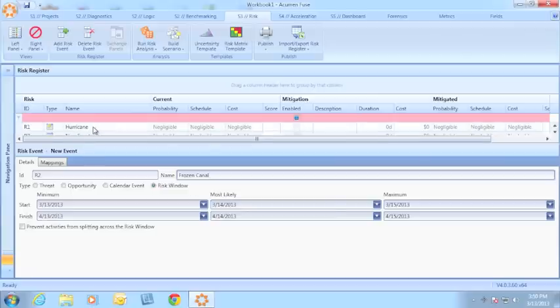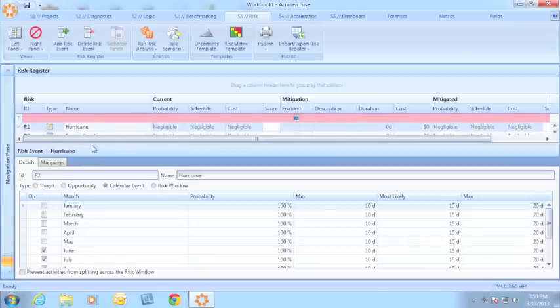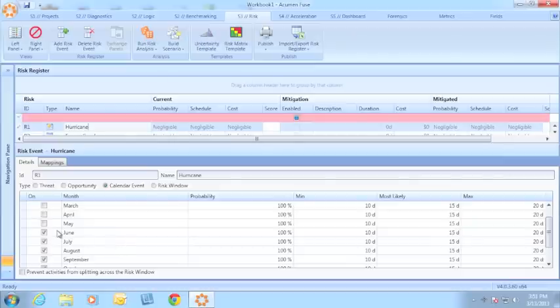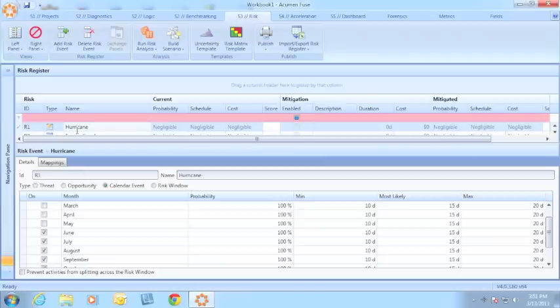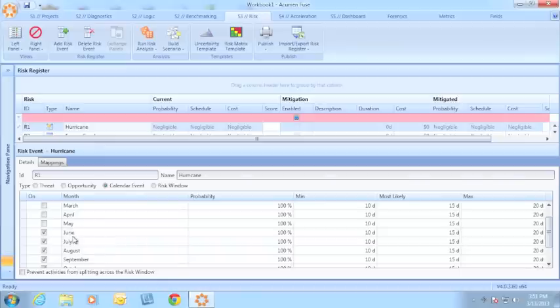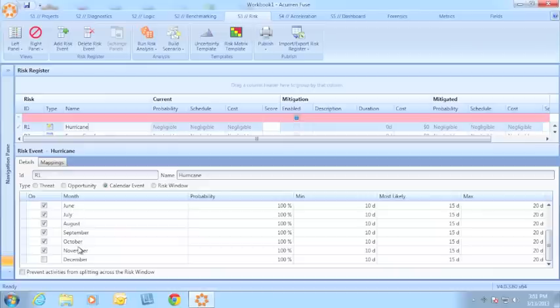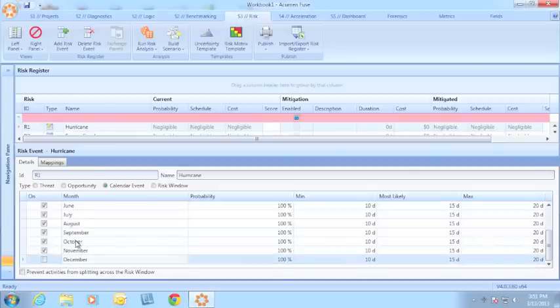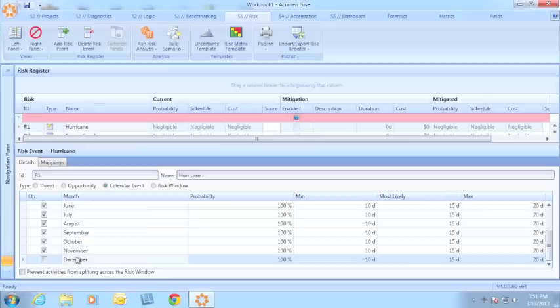You have two options with these kinds of risk events. You can either have the activities split during the risk analysis or you can prevent them from splitting. What this means is if I had an activity in the month of May that might be impacted by hurricane, but that activity wasn't set to finish until June in my hurricane season, I have the option to say that the activity can either begin work in May, stop work during hurricane season if the hurricane season hits, and then resume work in December, or I can have the model move the entire activity until after the risk event window is over.